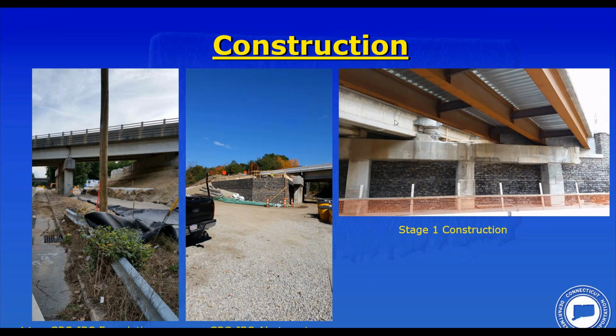So that is a form of ABC. It's an ABC method being applied to a non-ABC project. So we're building as much of the structure offline as we can before we start impacting traffic.